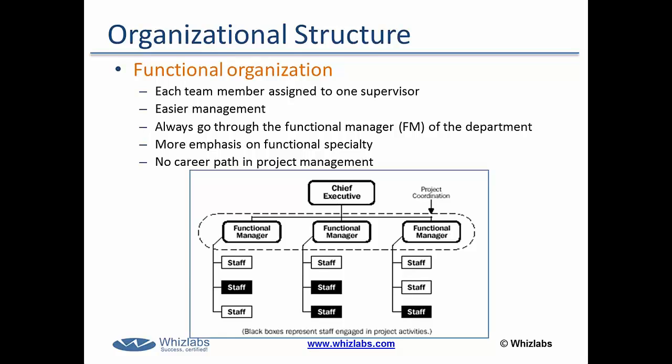A Functional Organization is mainly structured through various functional departments. As you can see in the diagram, we have various functional departments headed by Functional Managers. The Functional Managers report into the Chief Executive. In this type of organization, there is no direct role of a Project Manager. The Project Manager rather works like a Project Coordinator, and the projects are led by the Functional Managers.